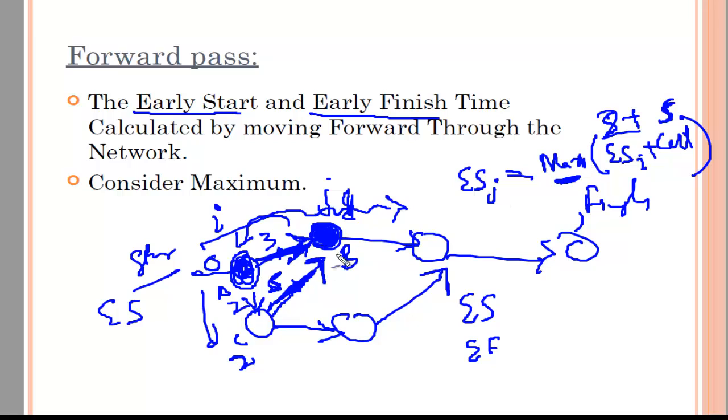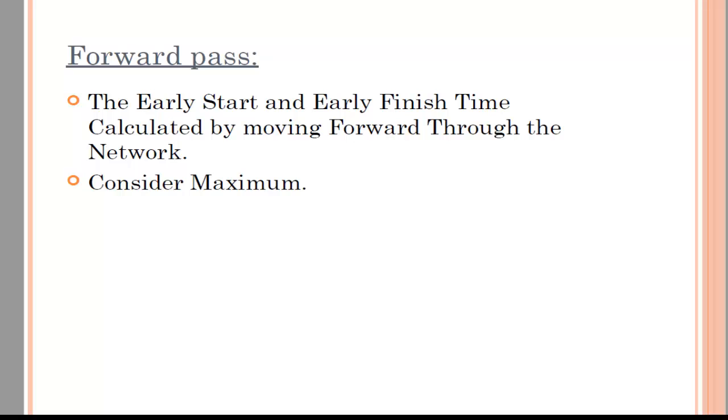Okay, so what I am saying is, if I have a particular node, listen carefully, I will repeat this in the video and with the examples you'll understand properly. I have this node, and it has come from many nodes. For example, many nodes are the predecessors of it, and I will see who is the maximum out of these, and add the cost to the maximum.